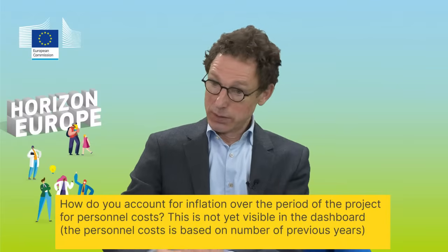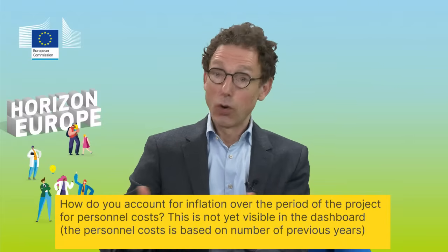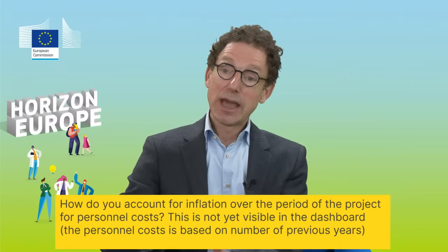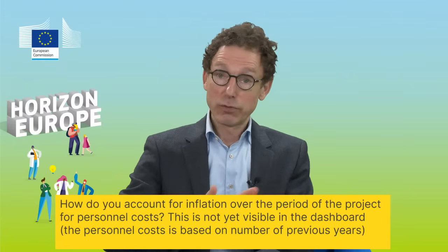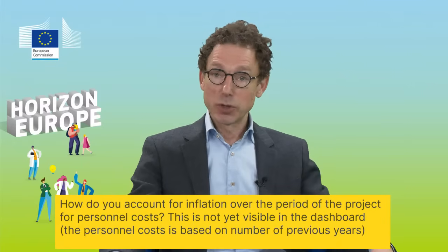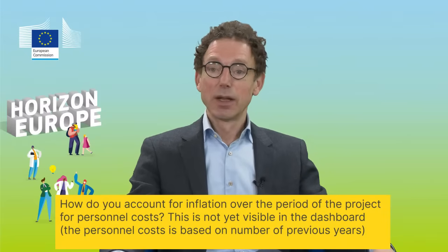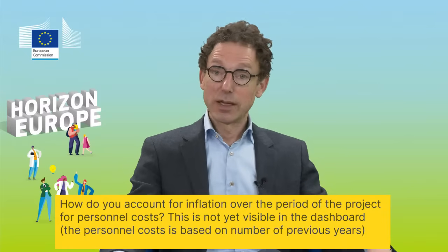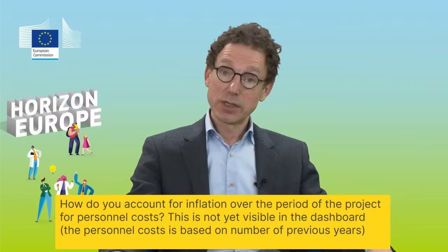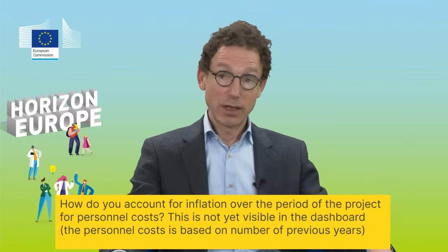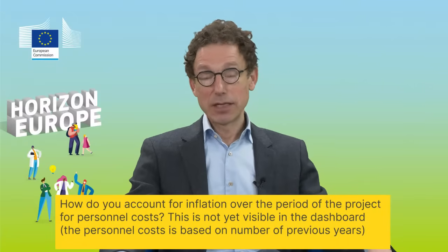So you estimate your costs over the project duration, and this is what you put in. We have absolutely instructed our experts to be aware that costs can increase in the 3, 4, 5 years after the project has started, and this is a perfectly valid reason to take into account and to justify that costs may be higher than what is indicated in the dashboard.